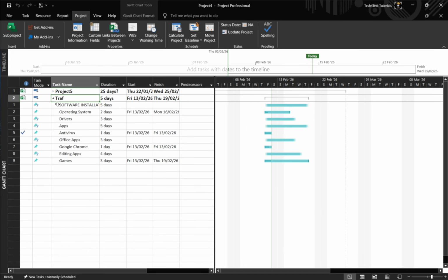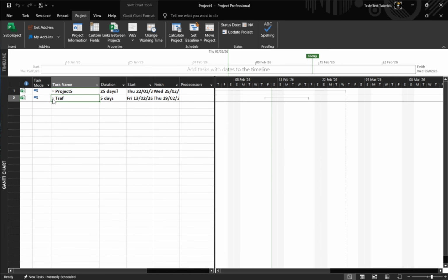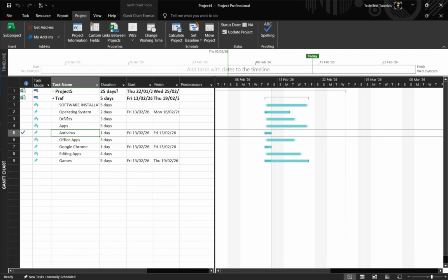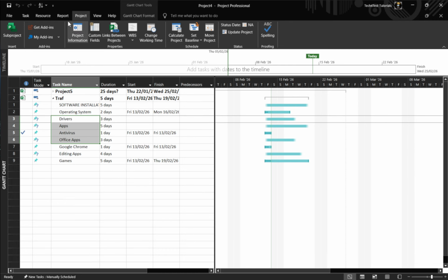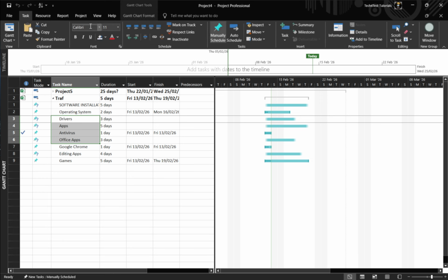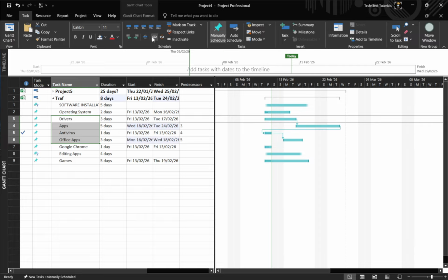If your projects depend on each other, you can create cross-project links directly in the master. Expand the subprojects to reveal the tasks you want to connect, then use the predecessors or successors column, or the Link Tasks button, to relate a task in one subproject to a task in another. For example, link a final review in Project A to the kickoff in Project B. This program-level dependency makes the ripple effects of delays immediately visible across schedules, helping you communicate realistic dates and manage risks.